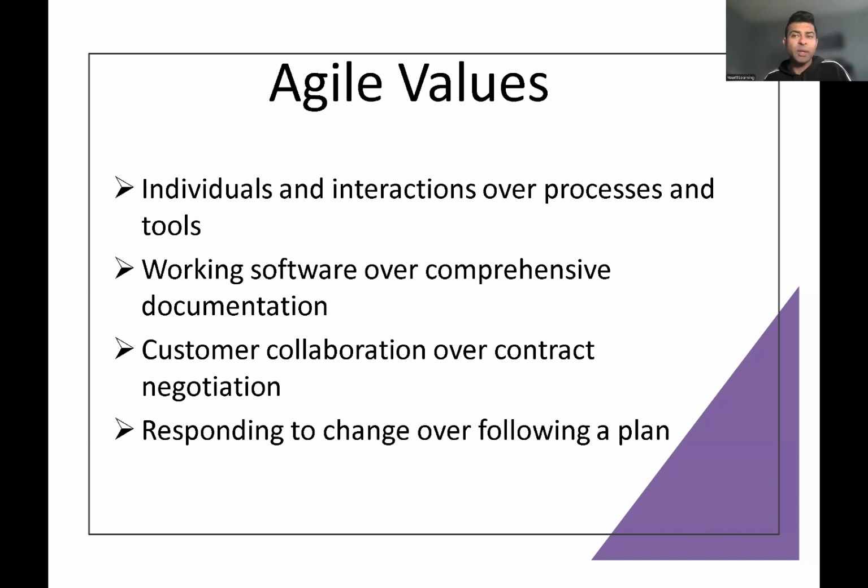They will ask a couple of questions. You might have the answer. If you don't have the answer, go back to your stakeholder and ask them. Once it gets through the sprint refinement, it goes to the sprint grooming, where we story point the user story. The story point basically means how much time it will take for this user story to be completed. Once that is done, then the user story comes to the sprint planning.